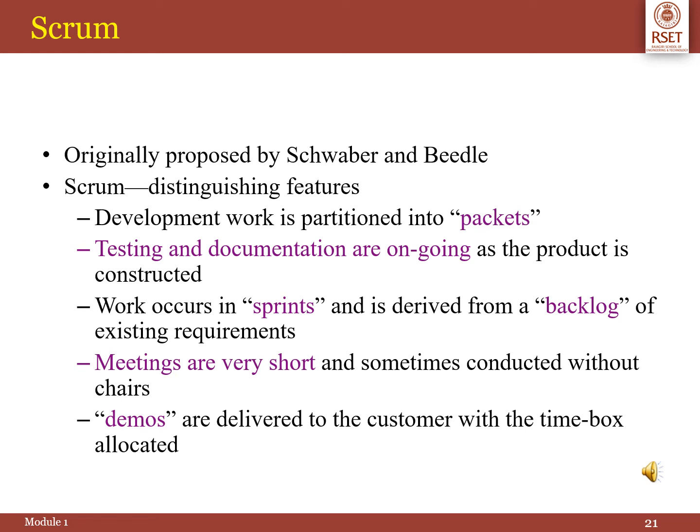Development work is partitioned into packets. Testing and documentation are ongoing as the product is constructed. The work occurs in sprints and is derived from a backlog of existing requirements. Meetings are very short and sometimes conducted without any chairs. Demos are delivered to the customer with a time box allocated.